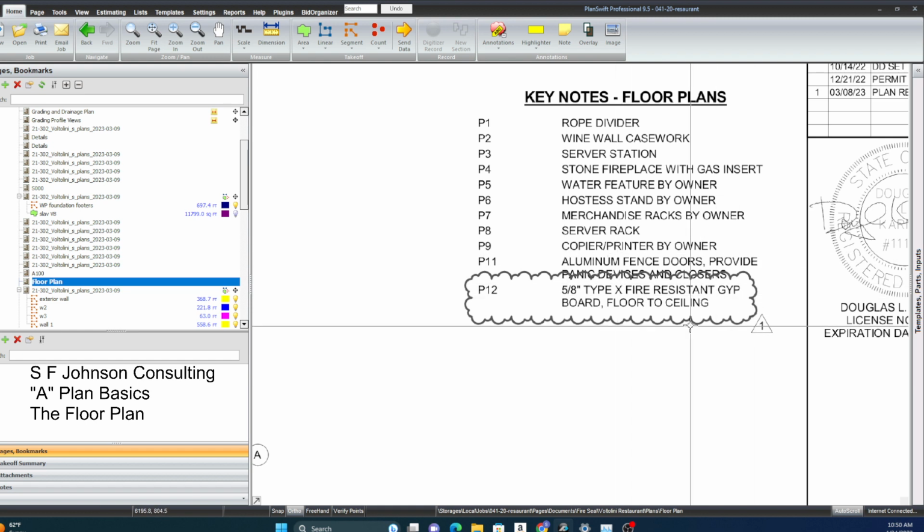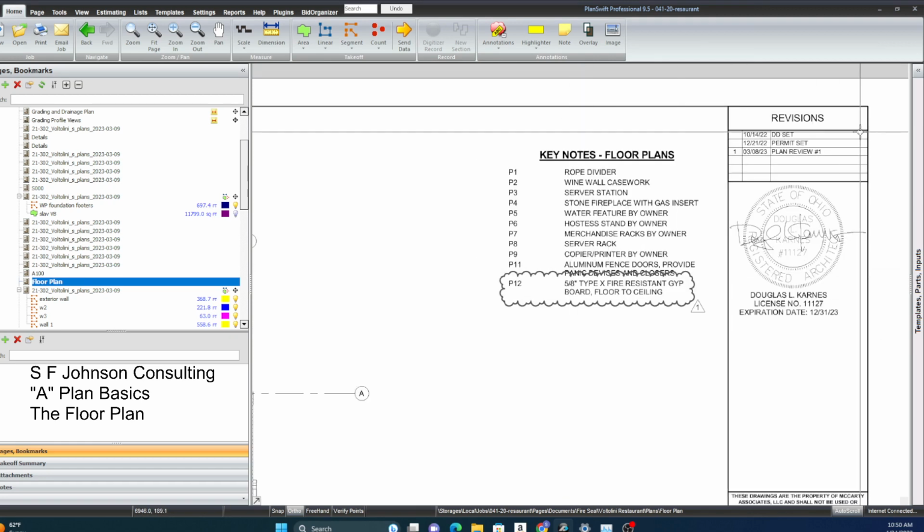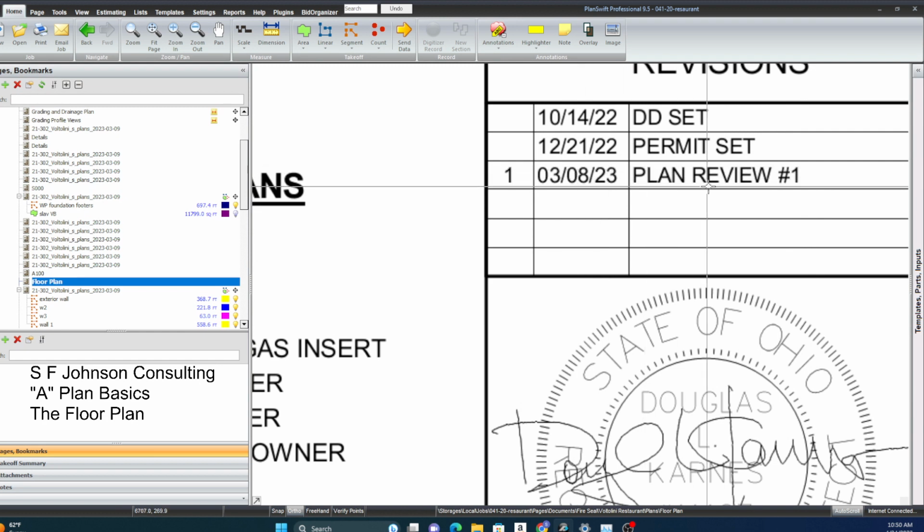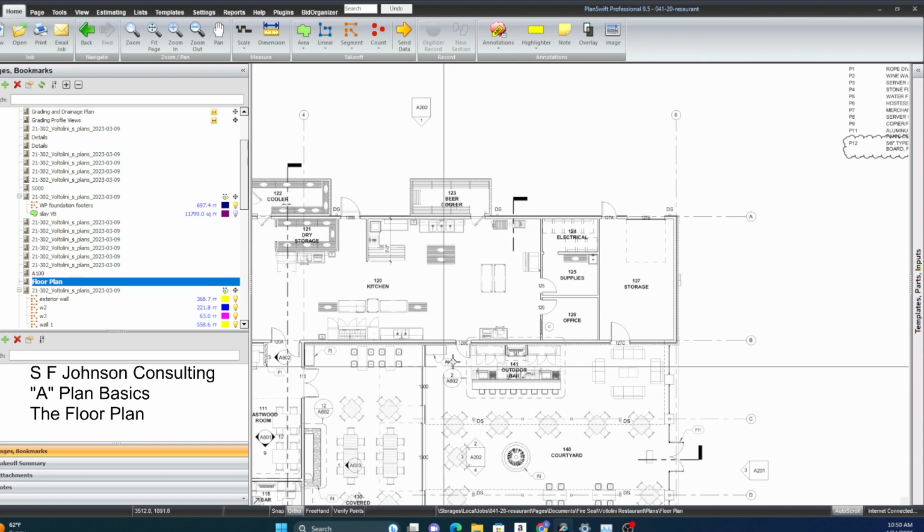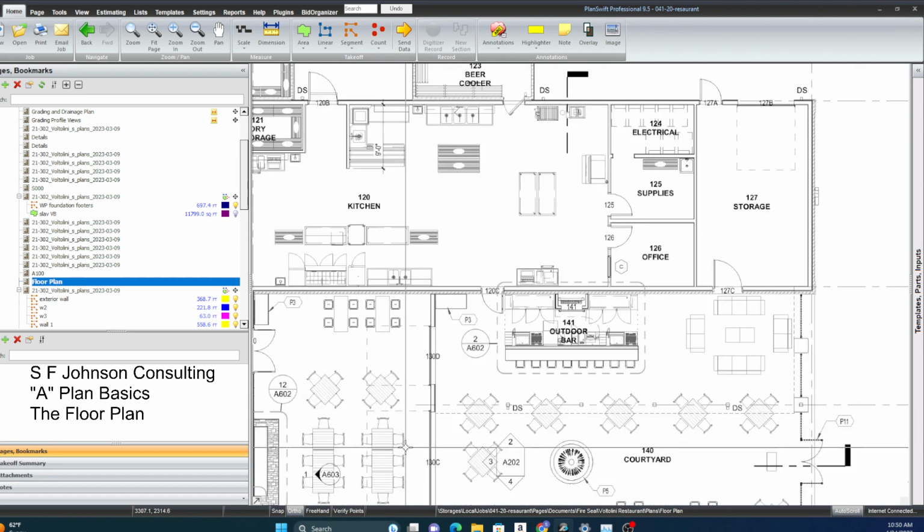And the cloud, that means it's been revised at least once, and I think again today. And so we have to make sure that we account for the revisions, and when we submit the estimate, you always have to make sure that you say this estimate is based on plans and specifications dated the revision date. Keep that in mind.